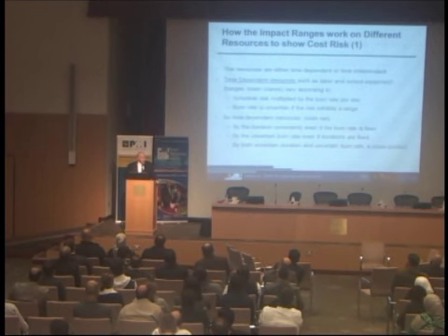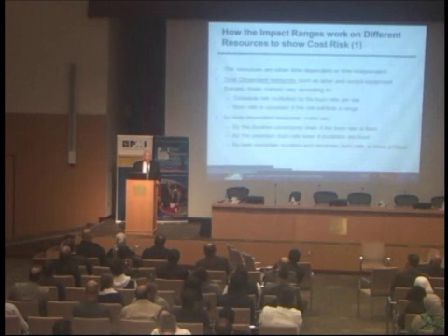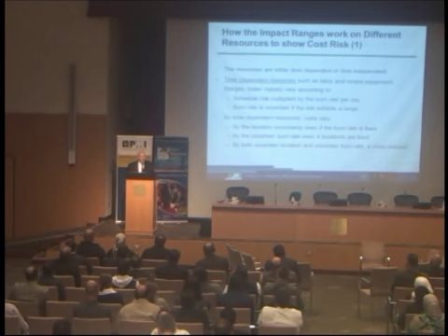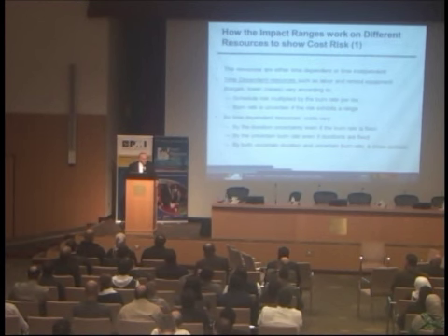And I'm surprised at this big, internationally recognized company that doesn't want to do it. But secondly, we don't need detailed resources. We just need resources that are good enough to allow us to put the entire estimate into the schedule on the right activities.